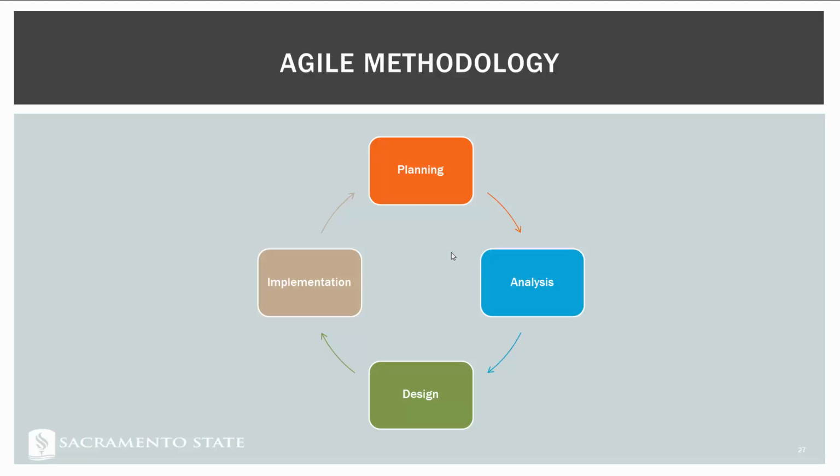So here's an example. Google does a lot of Agile methodology. With the Chrome browser, which many of you use, Google has moved to a very quick release cycle. They use an Agile approach where every single release, they don't make a humongous change, but they make small changes every few weeks.